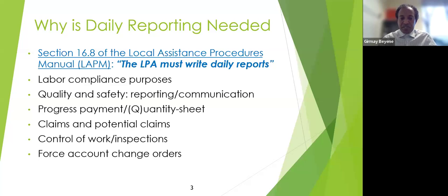The other thing is for quality and safety and reporting. The progress of the work in the field has to be documented daily using daily reports. So we use that information to make sure the quality and the safety of the project are happening in accordance with the plans and specifications and any guidance that the local agency may have. We also use that information for reporting. The inspector writes daily reports, and the resident engineer and supervisor should be able to review them and understand what is occurring in the field on a daily basis.